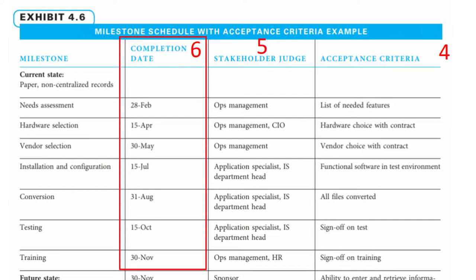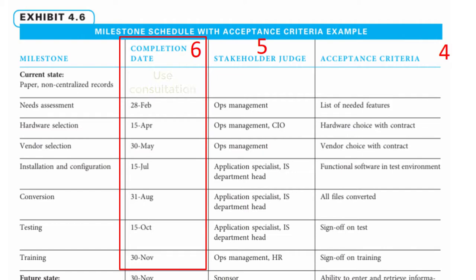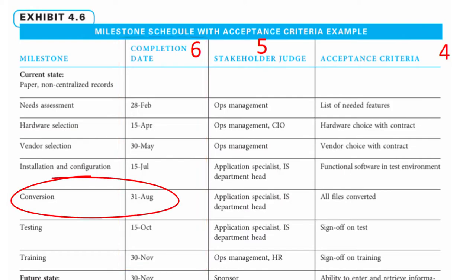Finally, determine expected completion dates for each milestone. It's important that this is realistic — avoid being overly optimistic or pessimistic. A project manager will usually consult with others to determine reasonable timeframes. On this project, the completion date for converting manual to digital files is the 31st of August. Presuming this activity could commence in late February, this allows approximately 6 to 7 months to complete the conversion.